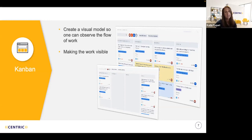And then we had daily stand-ups with the steering committee. And so that really helped us keep aligned on the client's actions and on our actions. And so we would identify any blockers or roadblocks that we ran into. And then we also had weekly reviews where we could capture that instant feedback for any modifications or enhancements. That really helped us move forward and have that iterative process. So we were getting constant feedback and making tweaks to the workflow, making tweaks to the portal.